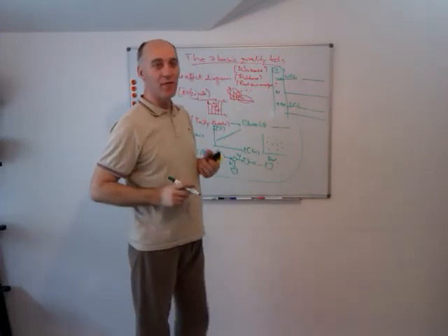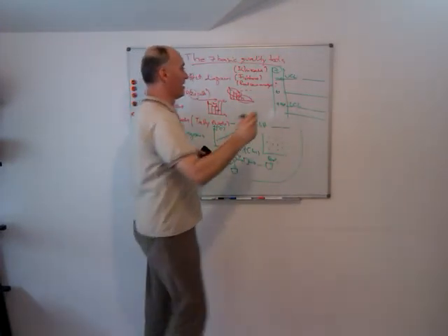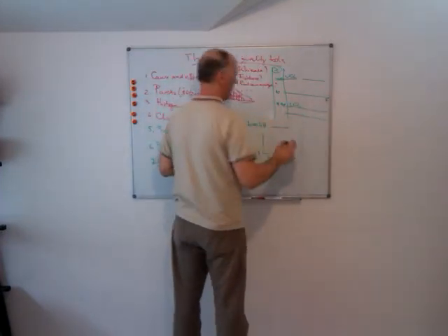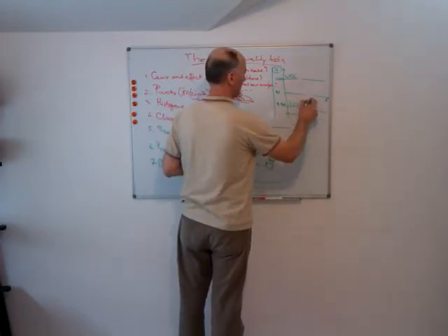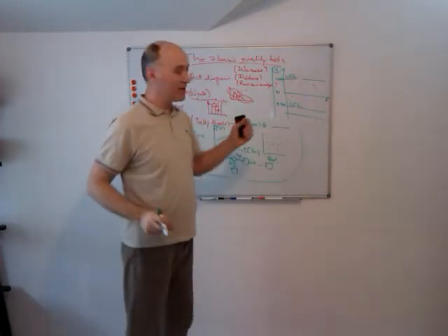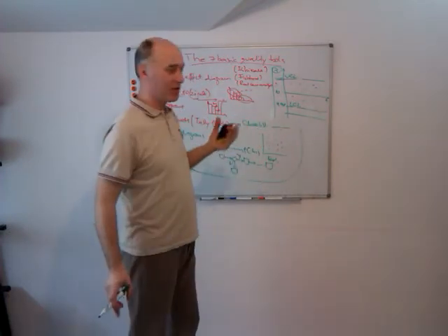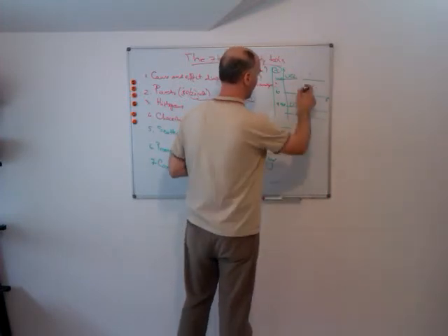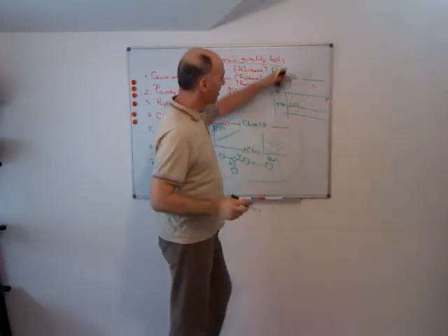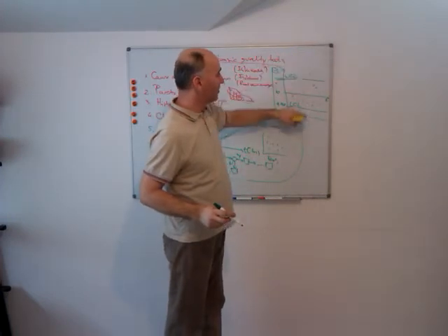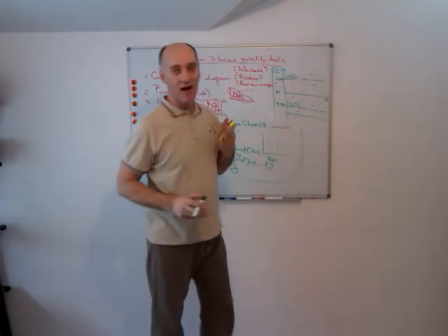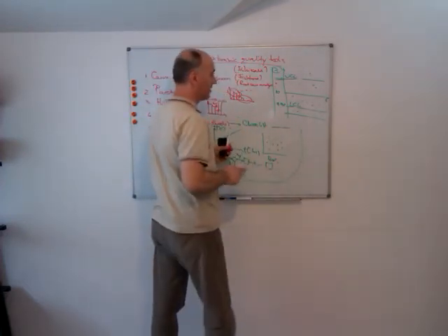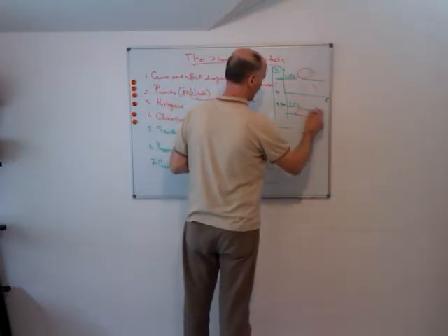And what we will do is make many measurements. This is the axis of time here, and we will make some measurements. Let's imagine we have 10,000 pieces and we pick 100 randomly, and some of them will be like that. Any measurement which is outside our limits means our process is out of control. Very important for you to remember for the exam. So this means the process is out of control.